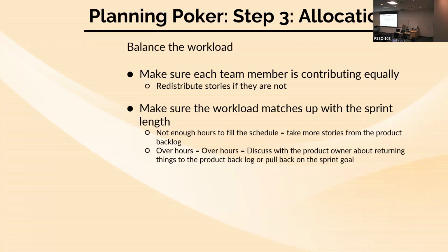We know from previous sprints that we were usually able to get done about 150 points worth of user stories. And when we estimated our sprint backlog for this sprint, we can see that we have 200 points of user stories. We just know from our team history, this is a quarter too much, right? We have too much work to get done during this time. We can't get all these tasks done. We need to put 50 points of user stories back, right?